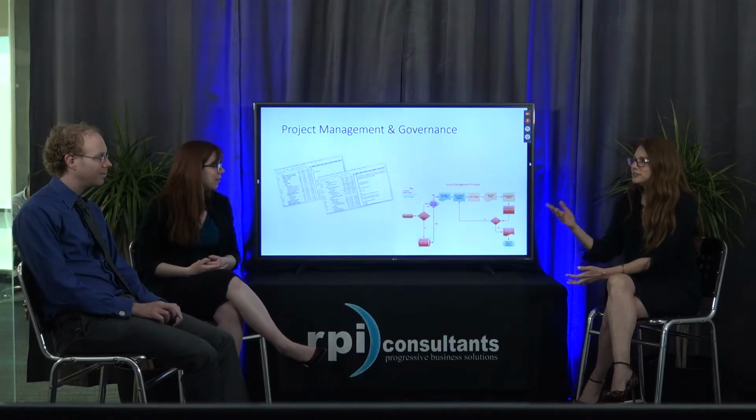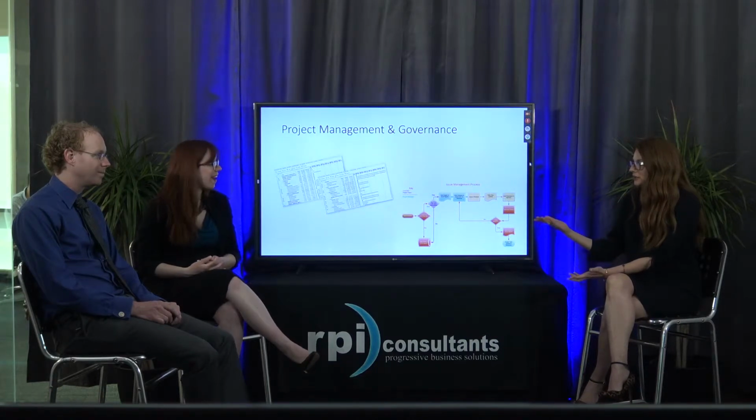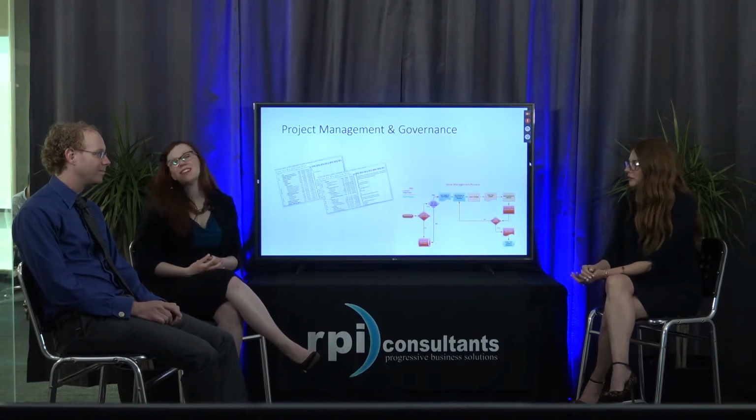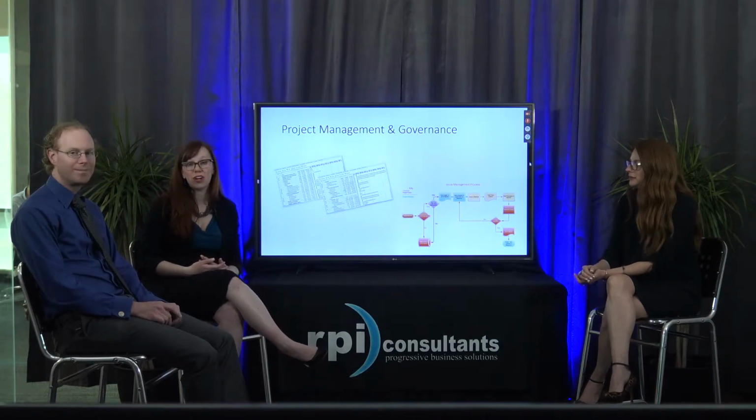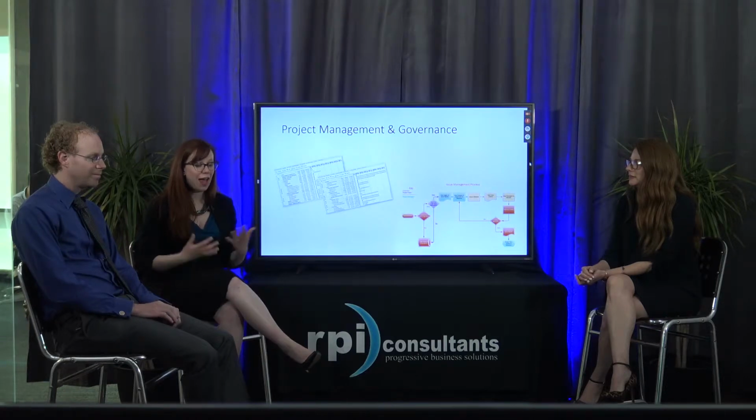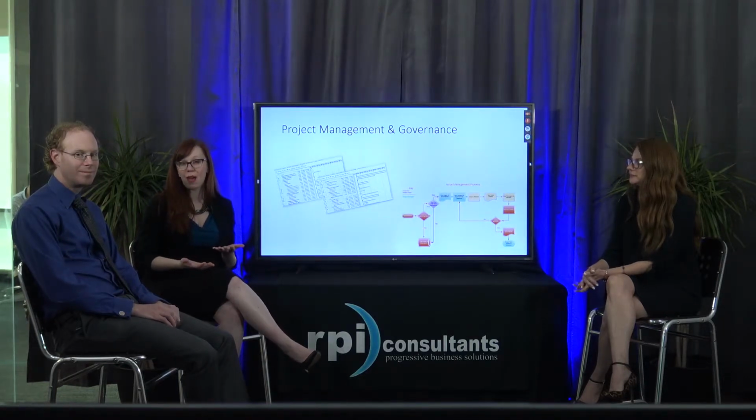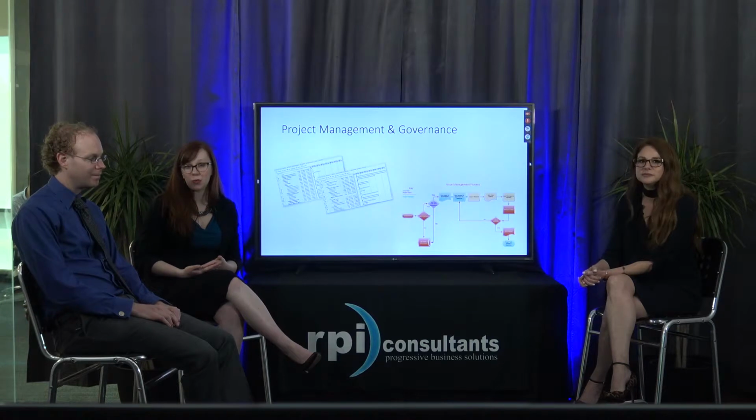Teresa, there's this cool thing you did at Bassett that's really new for us, the health check. Just let people know kind of about what we... So one of the things that we have started with our global HR implementations is taking a look at 11 key factors that we've identified from successful global HR implementations. And periodically, right before the major milestones of the project, we pull our steering committee together, and we, as the leadership of the project team, go through and say, hey, how is our project performing?